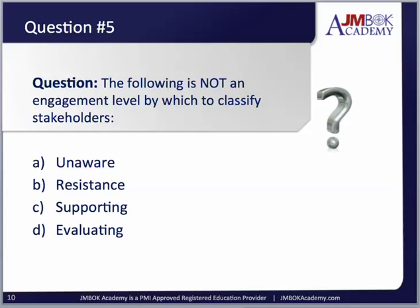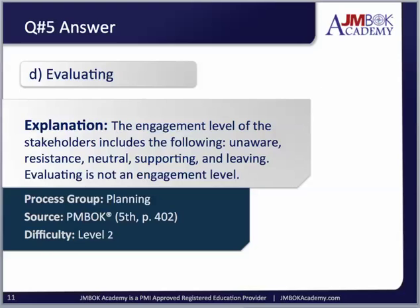Question number five — the final one for this lesson. The following is not an engagement level by which to classify stakeholders: Unaware, Resistance, Supporting, or Evaluating. The answer is Evaluating. The engagement levels of stakeholders include: Unaware, Resistance, Neutral, Supporting, and Leading. Evaluating is not an engagement level.